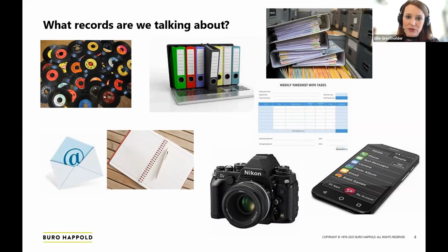So we're talking about photographs, site diaries, timesheets, handwritten notes during meetings, text messages, WhatsApp, I've even heard about Snapchats being used recently. We've got information that is stored electronically increasingly, but we've also still got hard copy documents that are in existence and are used. Obviously, we've got lots and lots of emails and lots of documents. So there's a huge range of records that we're talking about here.